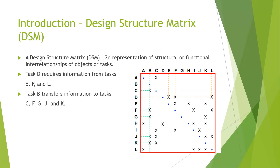A design structure matrix is a 2D representation of structural or functional interrelationships of objects or tasks. The tasks are placed around the matrix as rows and columns and are lettered — tasks A, B, C, D, E, and so on. X's represent task dependencies. So task D requires information from tasks E, F, and L, meaning if you go to row D, task D depends on E, F, and L — those are the X's marked there.